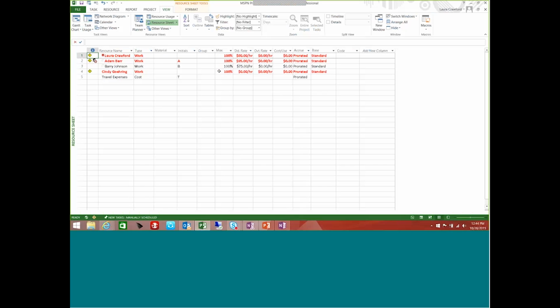No. And that's because nobody is heads down working on just your project 8 hours a day. Even if they are only working on your project and they're not assigned to any other projects, there's administrative work that they're doing. They're answering emails, they're going to a webinar like right now. Maybe they're attending a training class or weekly meetings, etc. As a project manager, you should be taking that into account and adjusting this.